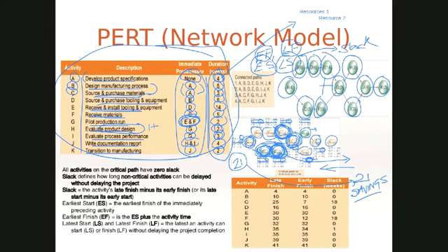K can only begin when J has been completed, which is week 39. It takes 2 weeks to complete, which means week 41. Once you've done it, firstly, you know that it's going to take you 41 weeks to complete the entire project. There are some tasks in between where resource needs have more slack, which means you also have more budgetary slack. There are also some where you don't have any kind of slack.